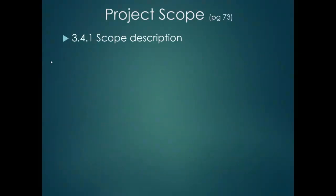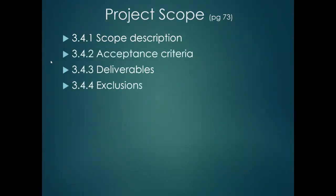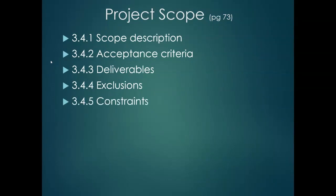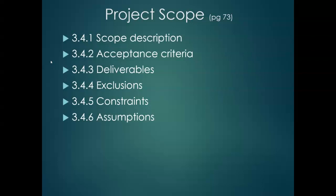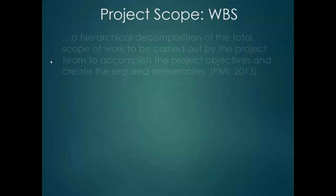What's included in the scope — this is on page 73 — includes the scope description, acceptance criteria, deliverables, exclusions, constraints, and assumptions. I spoke in more detail in the previous recording about the difference between constraints, assumptions, and risks, so go get some clarity on that from that recording.